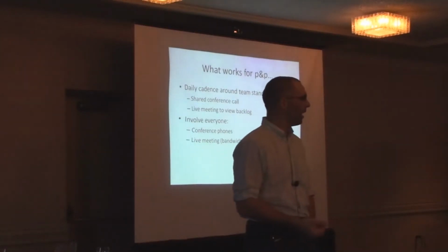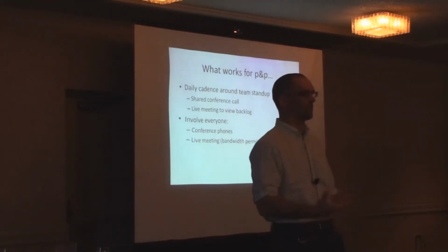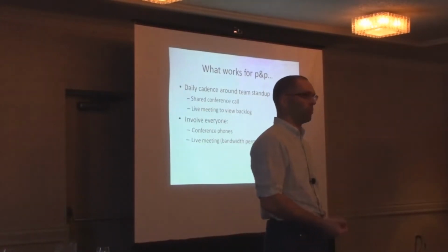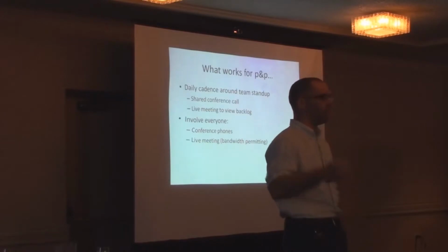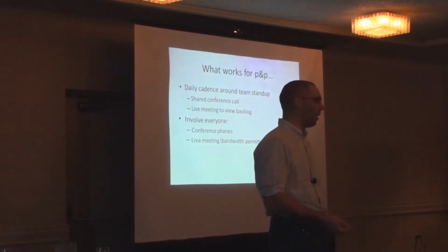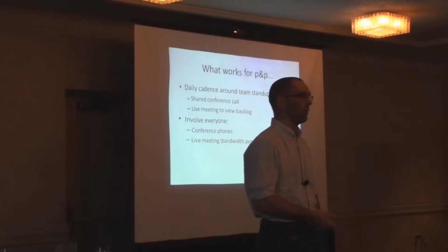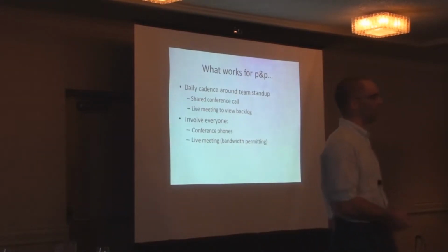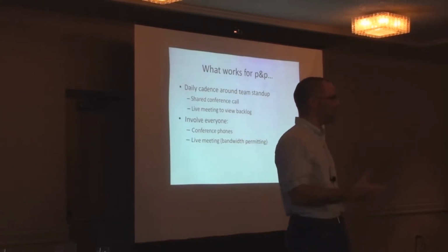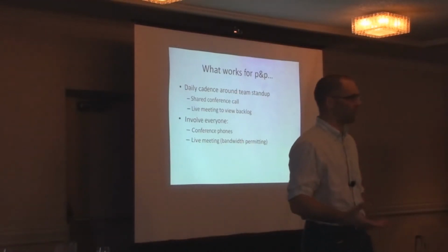This is actually something that quite a lot of teams do, this idea of a stand-up. So the idea is still to get through stand-up in 15 minutes. We do what's called putting stuff on the parking lot, which means someone's writing it on a board or putting it in a shared notepad session, and then we'll come to that after stand-up. And then, as I said, with some of these projects, we've actually had follow-up meetings after that to try and get everybody on the same page, especially early in the project with things like design. When everything's in a state of flux, you've maybe not got all your design fleshed out. So in XP terms, the system metaphor isn't quite there yet.